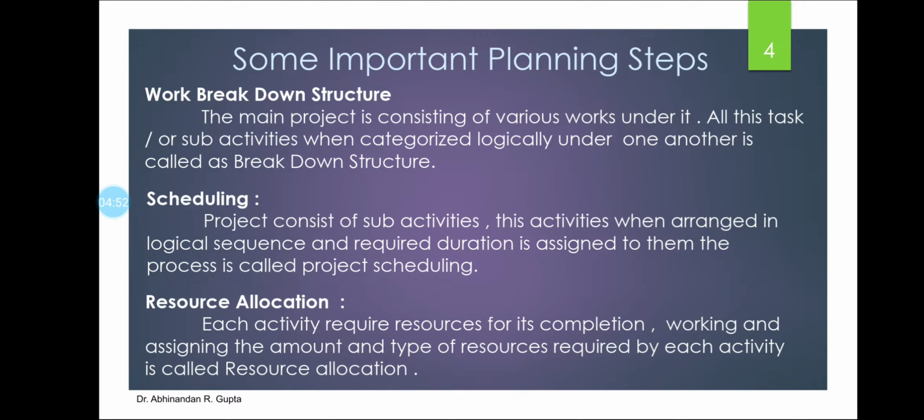Resource allocation. Once you have written all the tasks that you need to do, all the work or the activities in the logical sequence, and you have assigned the duration to them, the next step is to assign the resources that will be required. So for each and every activity, you need to find out what the various types of resources are.